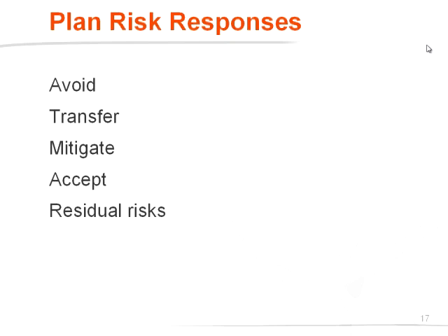It's the remainder. And the other type of risks which you should always be able to talk about are secondary risks. These are new risks, and they occur because you implement a risk response, because nearly everything which you do leads to new risks. And these are the so-called secondary risks, and you should always be able to distinguish them, and everybody should know the same language, the same words, so that there's no confusion.